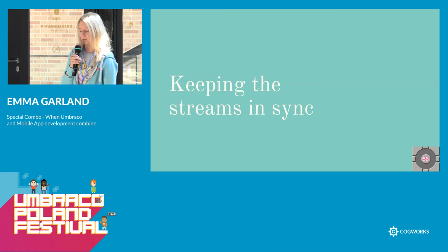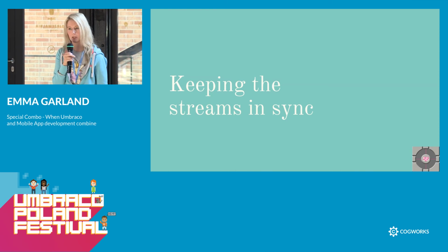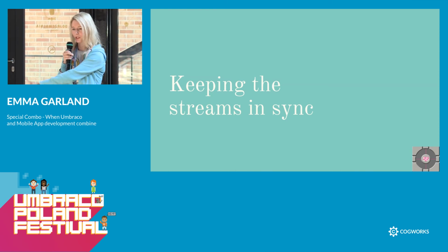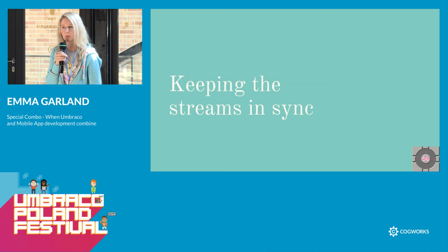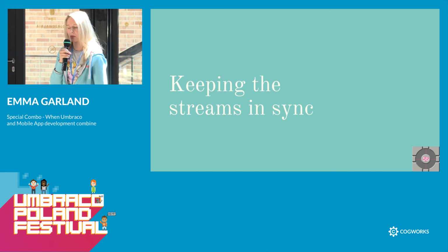What else? So there are updates, and then in terms of project management, we would do this differently again this time. We were on separate teams, so it was just Chris. He worked in a Kanban style, pulled things off the board. The only thing that was shared was the fact that we had the same product owner, so he was keeping on top of what the app was going to do and look like, and Chris was just creating tasks for himself and moving them along. Whereas on the website team, we did Agile, and we had sprint planning and various boards.